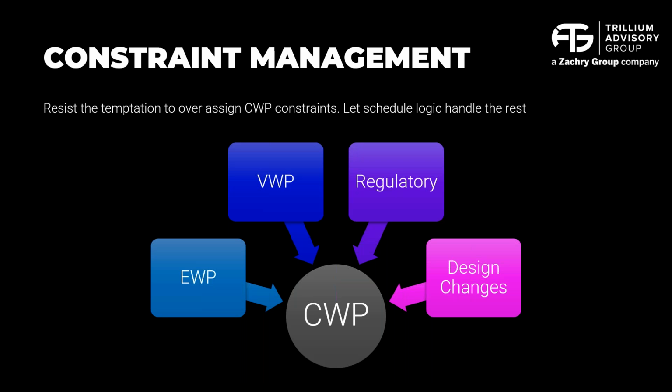If they're arising after the CWP started, of course, you've got to bring extra pressure to bear for quick and effective closeout. You can't sit back and consider that, well, they only have so many engineers to do the work. No, we need to have these CWPs and these issues addressed immediately. So going back and tying into the resource curves, what do we need for specific EWPs that are already planned for, and then what kind of resources are needed to handle this load that's now developing in design changes.